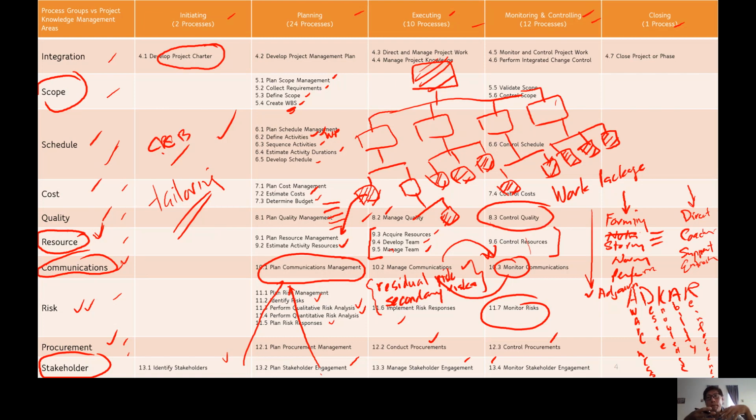Now, one thing I want to address to you is this. Whenever a milestone has been achieved, your team has created some deliverables, right? You want to get the customer to sign off, right? We are not going to get them to sign off at the very last of the deliverable. No, we do it incrementally, phase by phase, by the milestones. We don't group everything at the last day, on the day of handover. What if the customer says, no, it's not complete? You've got to go back to square one. So it's better to have it in phases. Although it's time consuming, it's better that way, okay? To slice it into phases or milestones or stages as we go.